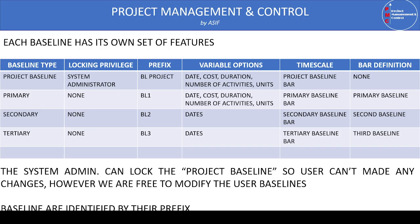All four types of baselines can be shown on the timeline. In the Define Bar dialog box, you can find bars for the project baseline, primary baseline, secondary baseline, and tertiary baseline. The bar definitions for primary, secondary, and tertiary baselines are already defined in P6 by default. However, for the project baseline, you need to define it yourself — the name appears in the list of bars, but the bar itself needs to be added manually.